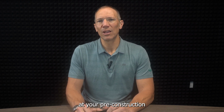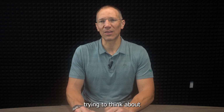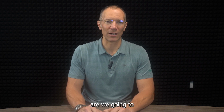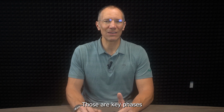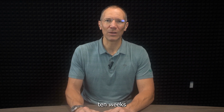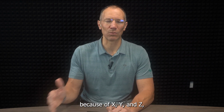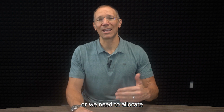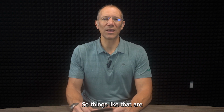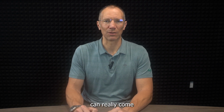When you're looking at your pre-construction phase and trying to think about what is the schedule that we're going to try to keep, how much labor we are going to have on the project, those are key phases where your project manager's insights can really add value to let you know that 10 weeks isn't enough to do that because of X, Y, and Z, or we need to allocate an extra 4 weeks if this and this occurs. So things like that are where your project manager's insights can really come about.